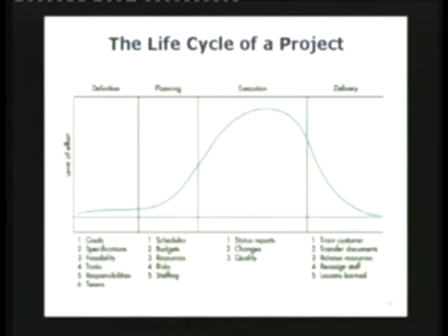As we discussed, there are steps involved in each of those, and they better be complete. Something very important for us to realize is that before you move on to the next stage, a gate has to be crossed. This gate is the quality control gate. For example, as you move from defining to planning, the scope should be very clear. Without that, your planning will be all lopsided.